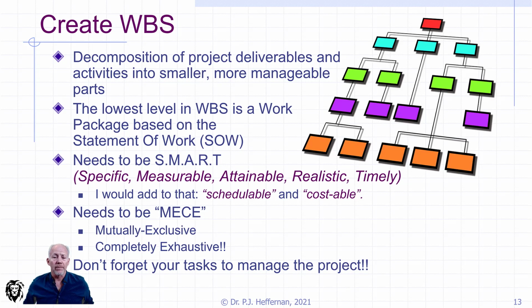The one thing that a lot of people leave out, and you'll even see that coming up, is don't forget the task to manage the project. You have absolutely essential critical tasks, and your team has absolutely essential critical tasks that they need to do in order to manage the project, which have to be integrated and timed with the actual deliverables or activities associated with the project itself. So those should be done. So you probably need a subtask, which is project management, which has a series of tasks below that.